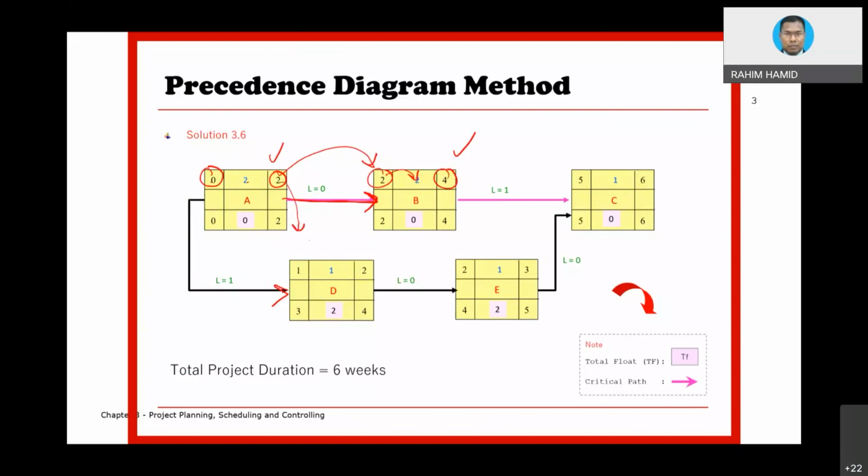No, it is not right. You have to look at the start to start. The value that you are going to transfer is this value, but then there is a +1. So for forward pass, remember we do plus, plus, plus. It is as if 0 plus 1. Okay, so 0 plus 1 equivalent to 1. 1 plus 1 equivalent to 2. Okay, then 2 you transfer here. 2 plus 1 equivalent to 3. So the 3 value is there.